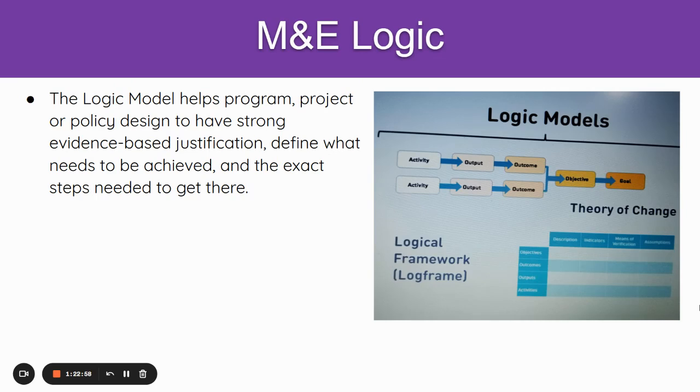But we make these assumptions so that we can implement the project bearing in mind that these are the conditions we need to meet. For example, we said that one assumption we make is that community members will be encouraged to use the hand pump. So it means that we should carry out some awareness, encouraging them. We need to come up with a strategy on how we are going to encourage them to use the hand pump, because that is an assumption we are making, and we need to make an effort so that our assumption can be correct.